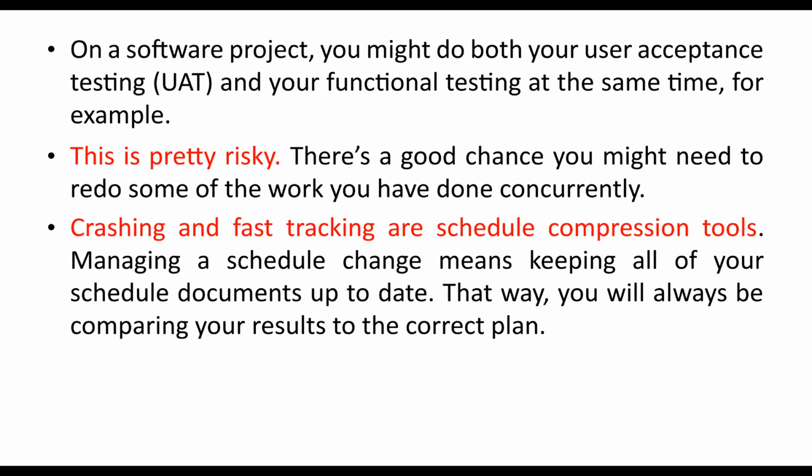For example, on a software project, you might do both your user acceptance testing, UAT, and your functional testing at the same time. Now, this is pretty risky.